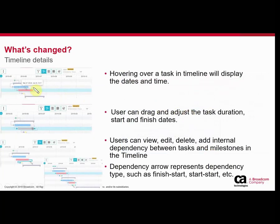You can do different types of interactions against tasks in the timeline view. Hovering over a specific task will display the date and time for that task. You can drag one of the two ends of a task bar to change its duration. You can drag the whole task to change its start and finish dates, shifting the entire task. You can select a dependency and delete it, or add a new dependency between tasks. The types of dependency you can add are start-to-finish, finish-to-finish, start-to-start, and finish-to-start.